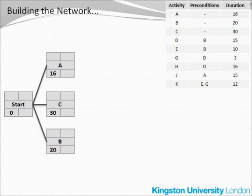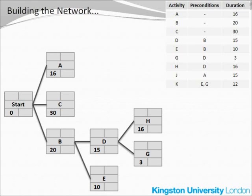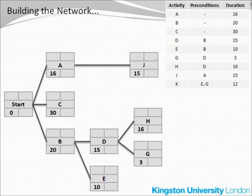Now we are ready to move on to activities D and E. According to the table, the precondition for both of them is activity B, so activities D and E will follow immediately after activity B. There is no activity F — the letter F is quite often omitted to avoid confusion with the letter E. Activities G and H both have precondition D, so they simply follow activity D. Activity J follows after A. Finally, activity K is a bit more complex because it has two preconditions, activity E and activity G.